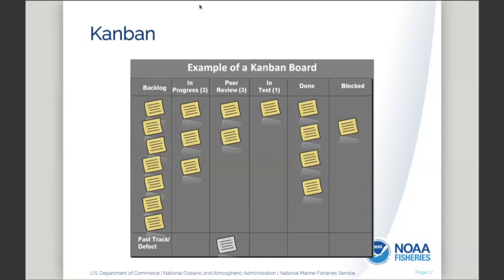You make a concrete task, like a day of work, 2 days of work, and you focus and get that done. There's lots and lots of work showing that when we multitask, try to do a million things at once, we get much less efficient, especially when it's a team working. The team gets really bogged down and inefficient if you do that.